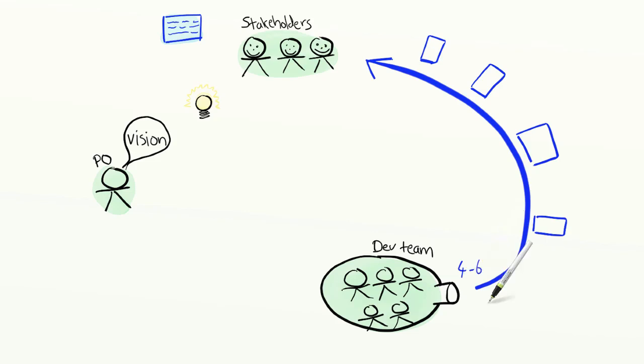Capacity is easy to measure. Just count the number of stories released per week. Some stories are big, so they count as 2. Some are small and count as a half. But all in all, it adds up to about 4 to 6 stories per week. Some people call these story points, but I'm just going to call them stories per week. In order to maintain this pace and not get bogged down by manual regression testing, the team invests heavily in automated testing and continuous integration. So every story has at least one automated acceptance test at the feature level, and most of the code has